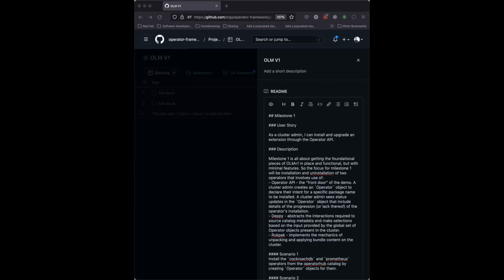So maybe part of the point I'm trying to make is, and I don't know if anybody really touched on this, but now that I walk through my thinking, I don't necessarily think we should try to define what milestone 2 is yet. Let's get to milestone 1, get some feedback about it, and once we know what that feedback is, then we know what milestone 2 probably should be. And maybe we can go one milestone in the future, right? Maybe it's not just nothing.